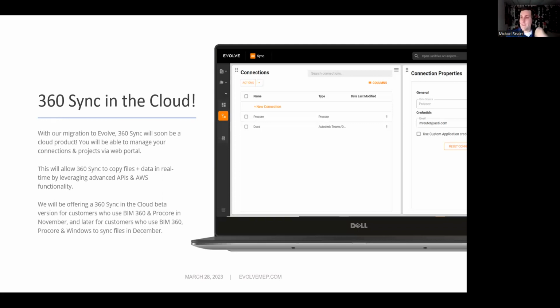Once that thing is marked as answered, it goes back to the general contractor automatically without any manual transmission. The general contractor reviews it, and then they mark it as approved or closed, and so then that distributes it out to all important parties.